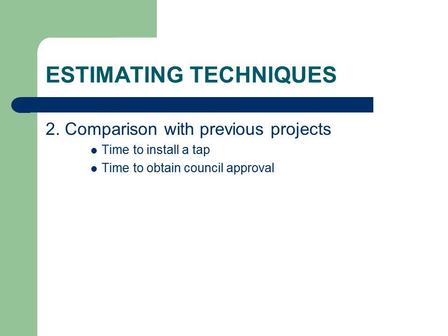The next estimating technique is using comparison with previous projects. If an activity or work package has been done previously on several occasions, it can save a lot of time if you use previous estimates for your scheduling. This is commonly done in the building and construction industry. It should, however, be used with care if the conditions or methods are not exactly the same, and it still may be wise to add contingency in to cater for unexpected circumstances.